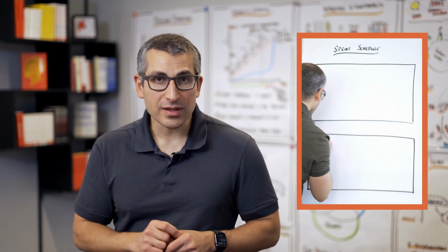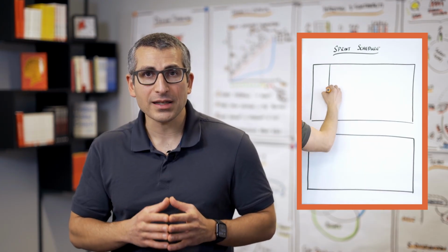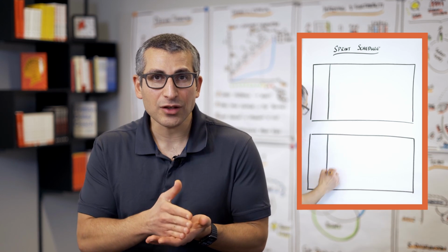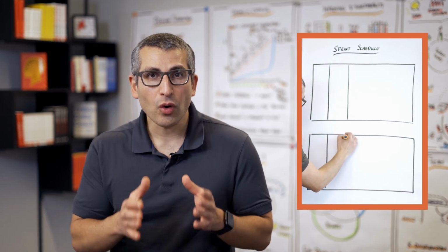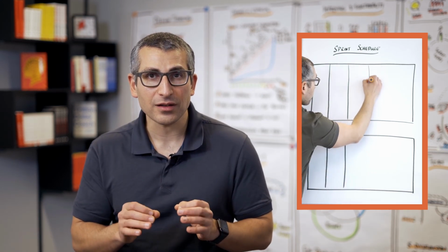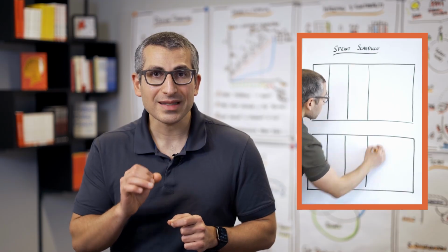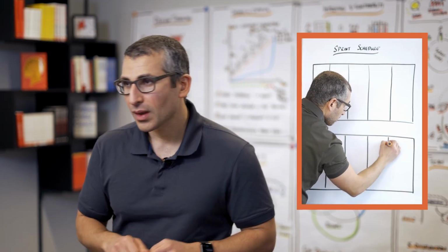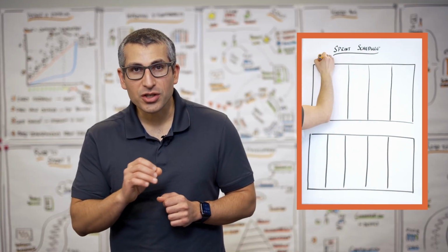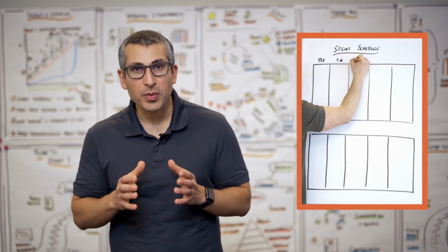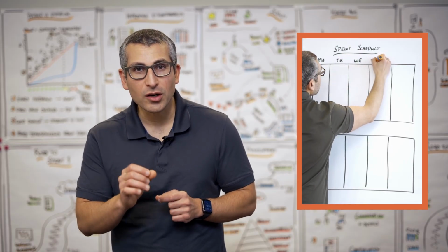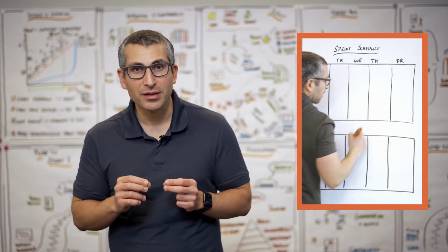The most common reason, from my perspective, from my experience, is that we have scheduled the sprint review at a point in time which doesn't fit our most important stakeholders' calendar. One way to address this challenge is to schedule our sprint with our customers, with our stakeholders' availability in mind.